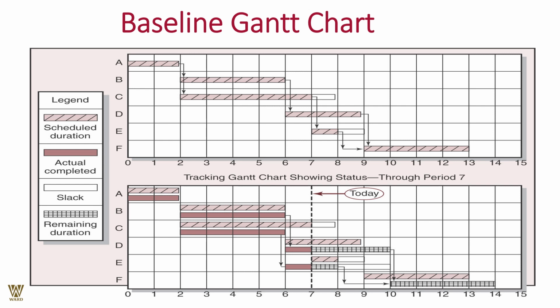Now what is in front of your screen is a baseline Gantt chart. A Gantt chart is nothing but an allocation of time and activities. Each of these bars is an activity which starts at A, and only after activity A completes can we start two activities simultaneously. Remember B and C go along with it, and this tells me the amount of days, time, or hours that an activity requires to continue. You look at it, B finishes off, but C continues to go on.